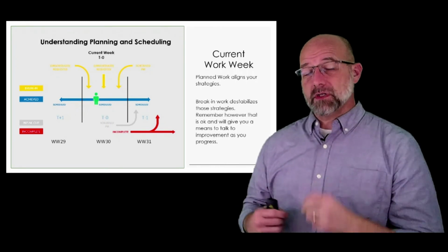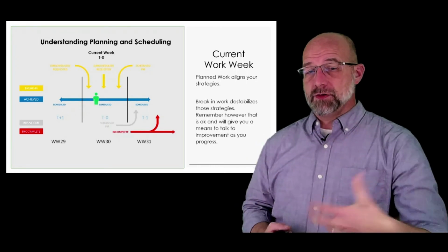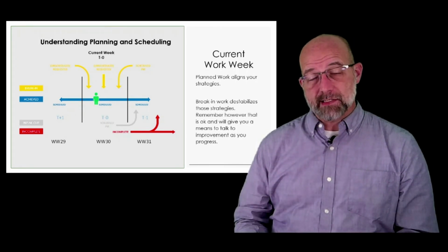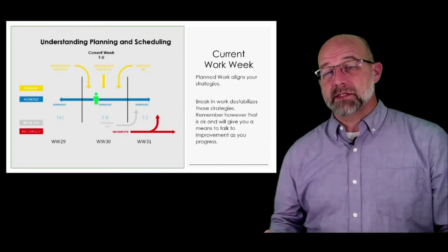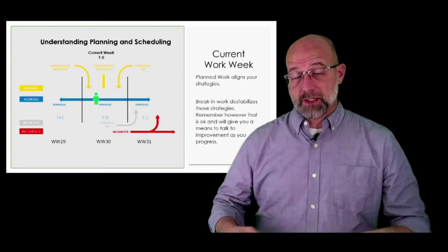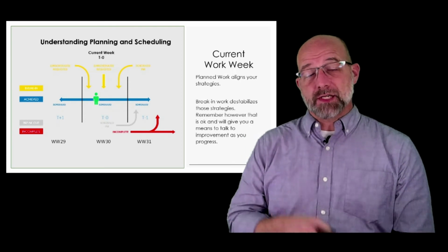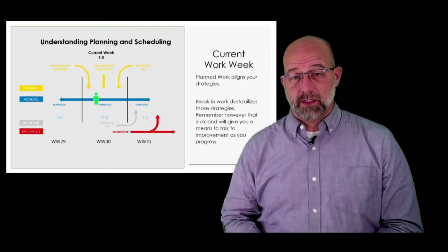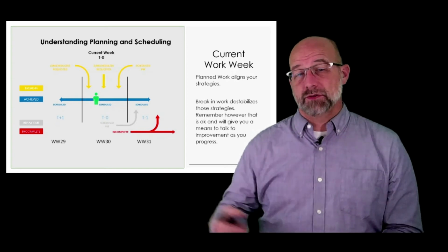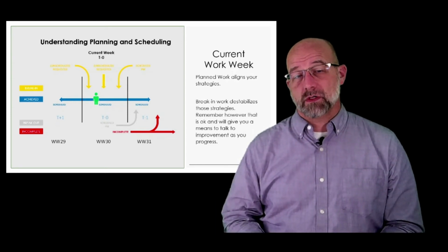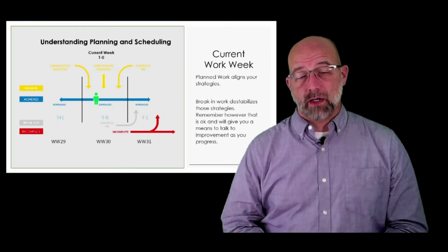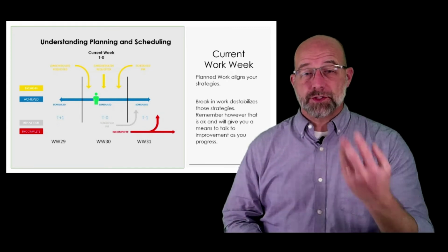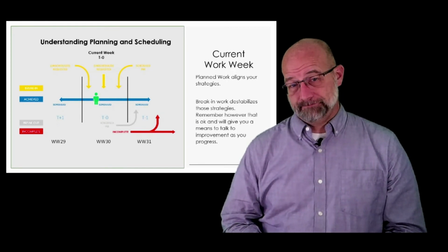Now I have a talking point to go back to our end users and support our SLAs, or to support the means and methods of our strategies behind making sure that our scheduled work is done and that we don't have a lot of reactive work. The more I have to reschedule something and get it done in a forecasted work week, the increase in my backlog happens. So we want to try and mitigate that and control it.